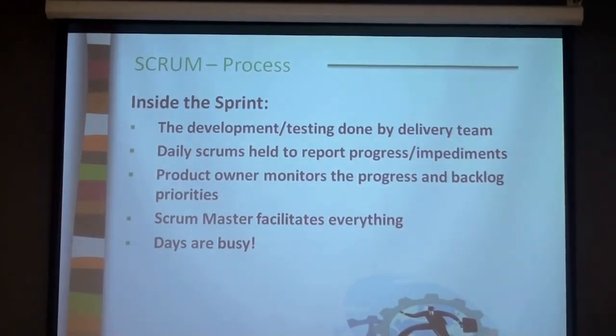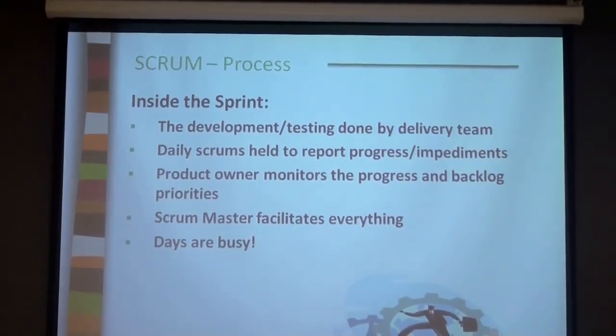So if you look inside the sprint, the development and testing, of course, is done by the delivery team, which consists of development and QA, sometimes business analysts, and the team does go through the daily Scrum meetings to report progress and report any blockages or impediments. The product owner monitors the progress and backlog priorities, and the Scrum Master facilitates everything else. And believe me, with Scrum, your days are busy.